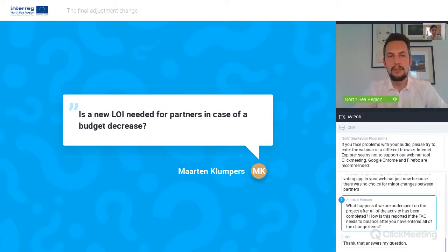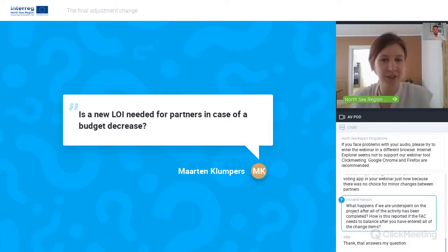Is a new letter of intent needed for partners in case of a budget decrease? Thanks for your question, Martin. And no, this is not the case. You only need to upload a new letter of intent in case the budget increases, as when the budget decreases, the full amount is already covered by the letter of intent. It's only needed for increased budgets. Thank you so much.